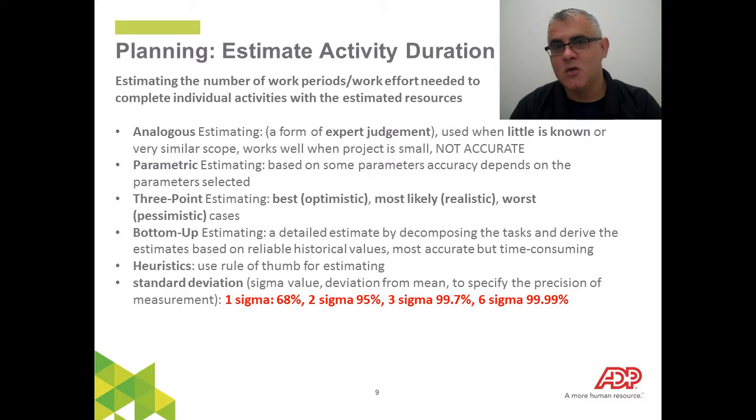So there's a few different key things here that you're really going to need to understand, and it's really terminology based. You need to understand the term. You need to understand when it's used and the benefits behind it and be able to compare them. So analogous estimating, that's kind of a form of expert judgment. You don't know much about a particular activity or how it's performed, so you're giving it a ballpark figure. It's definitely not accurate. It's not the most accurate, but it's close. It may be good enough for the estimate duration process at this point in time.